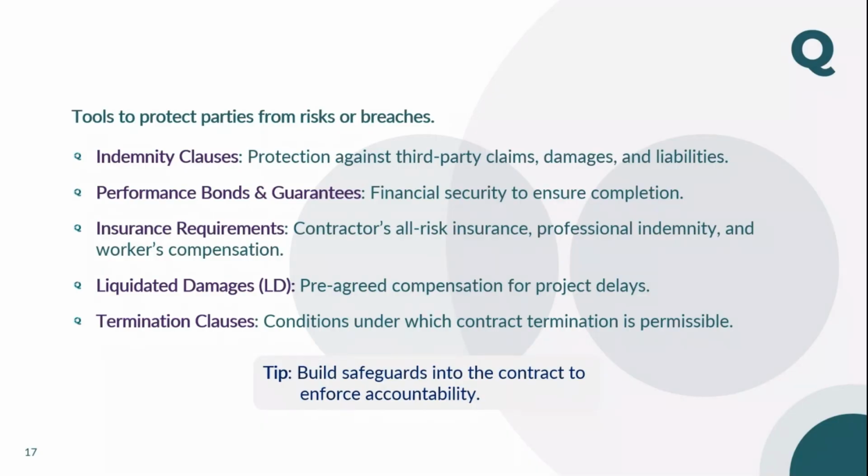So you have to ensure there are sufficient insurances in place, like insurance for the work, for the plant and equipment, for the workmen's compensation, your PI insurance, then your property owners insurance after the DLP, third party insurance, third party liability. All these insurances should be in place. When I say all these insurances, you have to read it in the context of your contract. As per your contract, what insurances are required, as you think, should be in place. So that is the first safeguard you did. You did a shielding for your company, first thing.